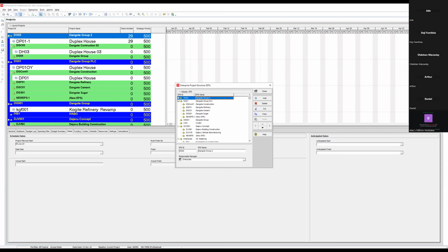Because I don't want it to swallow it, I want them to be at the same level, and I'll move it to the top. So you click on what you've just created. If it's not at the top, then you come to these arrows. This is an indent and outdent arrow. You can shift to the left, shift to the right, shift upward. If I shift upward, now it will go to the top of these. But if I try to shift again, you can see it's grayed out because it's a child to this.